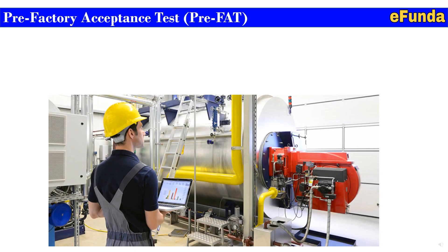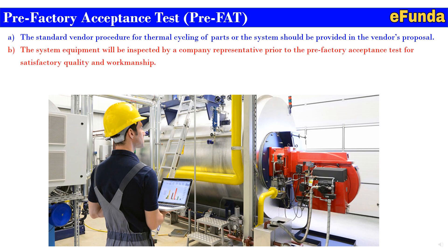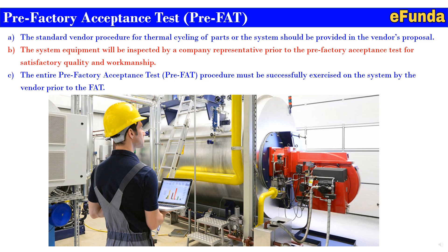Pre-factory acceptance test (Pre-FAT). One can refer to the picture showing the complete setup for pre-factory testing. The standard vendor procedure for thermal cycling of parts or the system should be provided in the vendor's proposal. The system equipment will be inspected by a company representative prior to the pre-FAT for satisfactory quality and workmanship. The entire pre-FAT procedure must be successfully exercised on the system by the vendor prior to the FAT and inspection offering to the client for factory acceptance test of the control system.